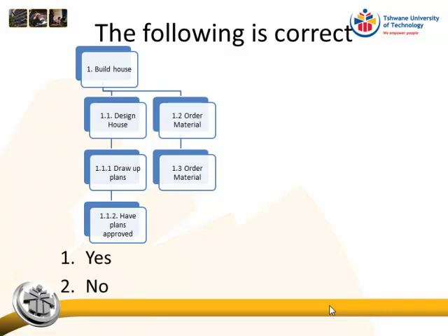But they're not necessarily in sequence, because we can't put the roof up first, although it's numbered as the first thing. Does that make sense? No, it does make sense. All I'm saying is, you can't put a child over a parent. Yes. There is a logic, but it's a hierarchical logic rather than a sequencing logic.